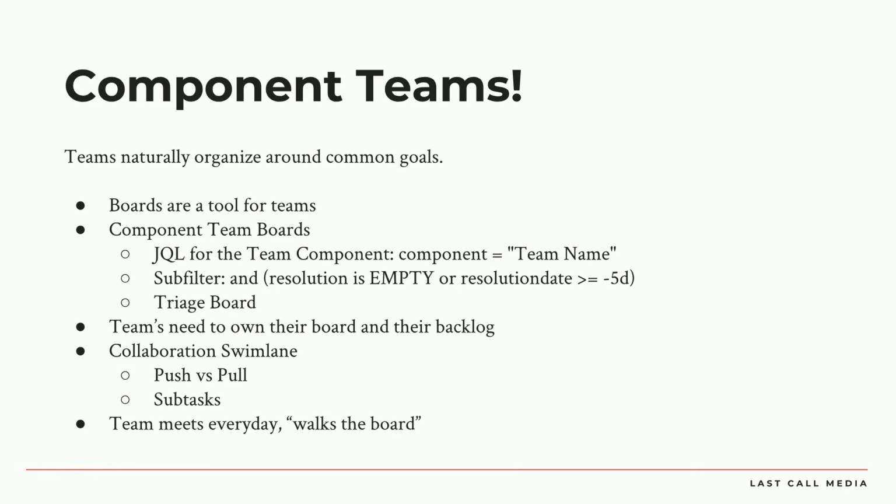Another thing to consider as a team and other teams is, does it make sense for people to just push their issues onto your board anytime they want? Or should they let you know in the issue that they think this is something you guys could take on, and you would tag that issue with your component to pull it to your own board? There's going to be a better flow and a better commitment if you operate on a pull model versus a push model. So it's pretty simple to do that. To have a board that your team owns, and the board can have a backlog that your team owns, really you just get stuff onto it with a component.